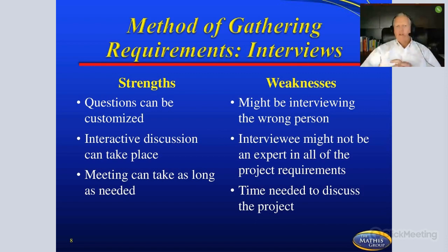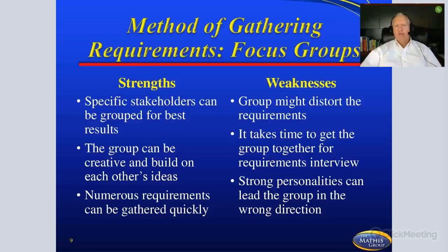The weakness of the interview is I might be interviewing the wrong person. And most of you who've done this for a long time, you know what I'm talking about. It's good people. It's the person that they've assigned to talk to you about the project, but it might not be the best person in giving us the requirements. The interviewee might not be the expert in the project area, and the time needed to discuss the project, a lot of times you'll find yourself very limited on how much time you're going to be able to talk with them. And so they're going to give you an hour. Well, that hour might not be enough time to really flesh this project out. So an interview is a great way of doing it.